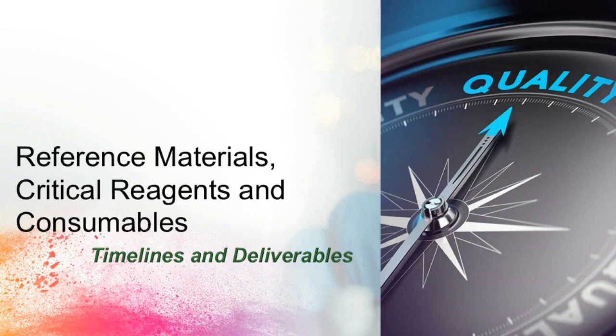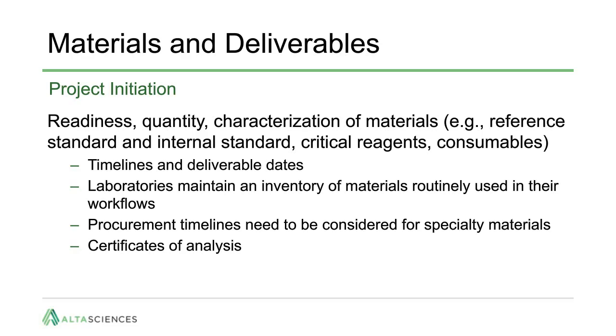The next section focuses on general considerations for materials as they relate to timelines and schedules. To initiate a project or a series of projects and lock in timelines and deliverables, the availability and quantity of reference standards, internal standards, critical reagents, and consumables needs to be determined.